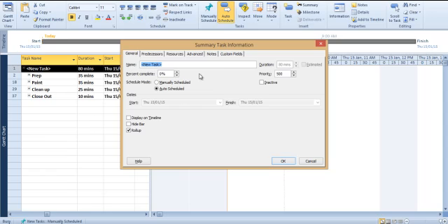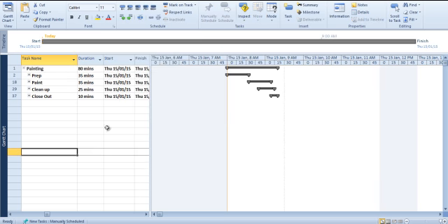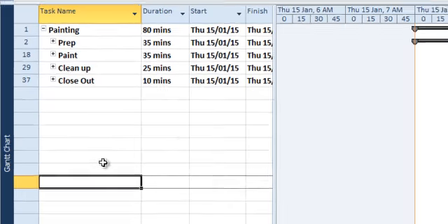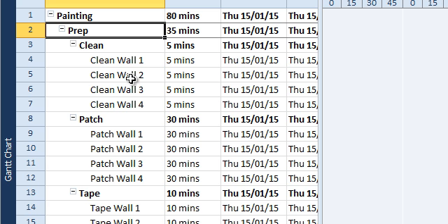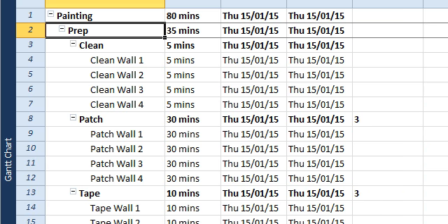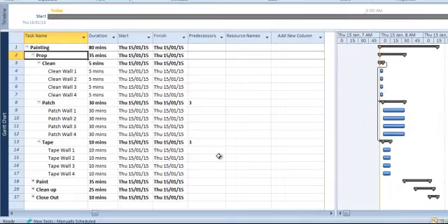I'm just going to quickly label this task painting because I keep bringing it up, so I may as well have a constant task there, and that shows us the whole works programs associated with painting. So we've got some great time savings from just doing some simple scheduling, and we still really haven't changed any of the scheduling relationships from one task to another. What I'm saying there is that every time we've scheduled something, we've just used the default. We've assumed the finish to start relationship.